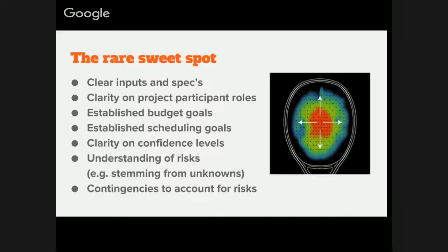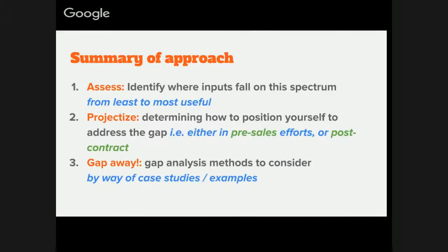And we typically make our proposals with contingency, just with that in mind. From our perspective, it's certainly critical for us to understand the risk on a project, because it could amount to the difference between making money, breaking even, or taking a loss. So we have a very sensitive relationship to risk as a business.